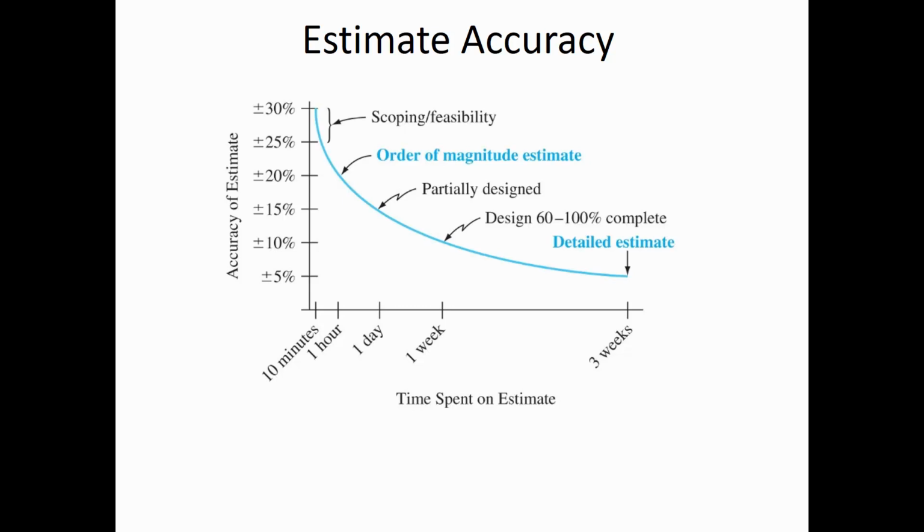Okay, what do you mean? Okay. Yeah, so it costs money to prepare an estimate. For example, an engineer who's working 3 weeks to prepare a cost estimate, that person has to get paid. And it may be a whole staff of people who are working to prepare a cost estimate. So you have to ask yourself, is the improved accuracy worth the expense of generating that accuracy?